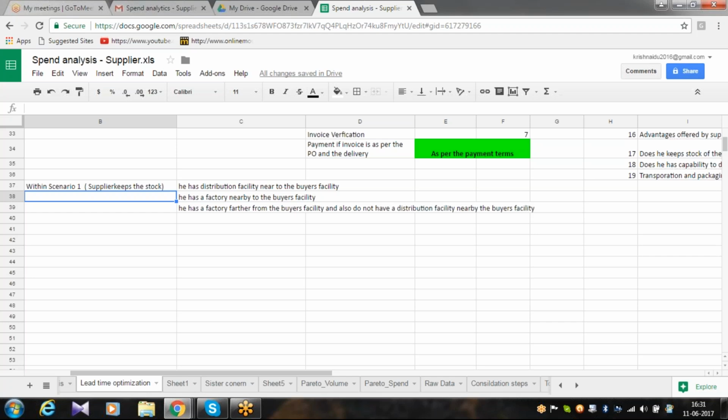If we have an option, then we will choose a supplier who has a distribution facility or a factory nearby to the buyer's facility. That will be the ideal scenario, because it will reduce the lead time. Okay. So now we understand how a lead time is built between a supplier and the buyer.